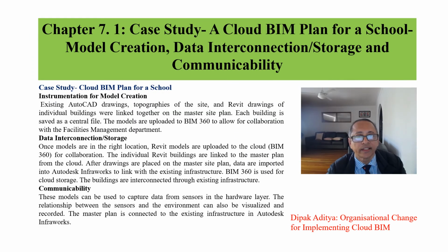A case study of cloud BIM plan for a school. AutoCAD and Revit drawings of the building were linked together in the master plan. The models were updated to BIM 360. Autodesk InfraWorks was used to link the existing infrastructure, and BIM 360 was used for cloud storage.